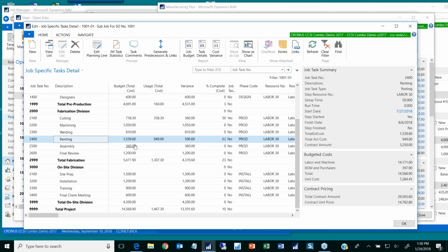You get a little more, I guess, statistical information comparing the budget versus the actual, seeing variances, seeing percent completes. There's no percent complete information. That's usually a non-issue in manufacturing because the manufacturing jobs tend to be fairly short. So they're quickies. Whereas these jobs tend to last a long time. So analyzing your percent complete per operation makes more sense than it does on a production order.